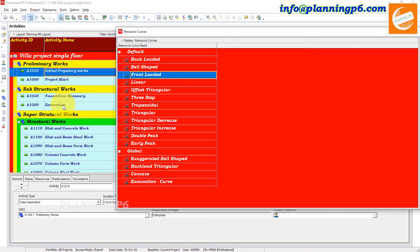If the productivity is at peak level or crossing the limits, it means your schedule is not good and resources are not leveled. The productivity peak must occur only once — then you can say your project planning is very good. This is in order to model a real resource loading.